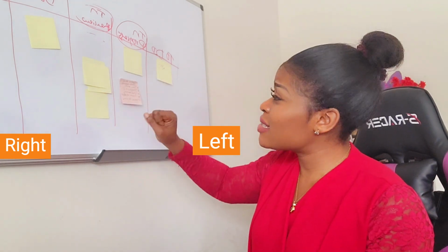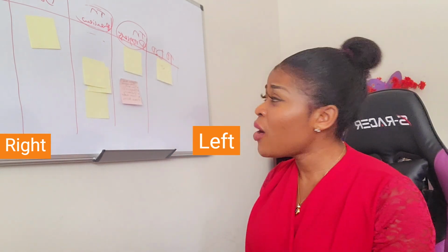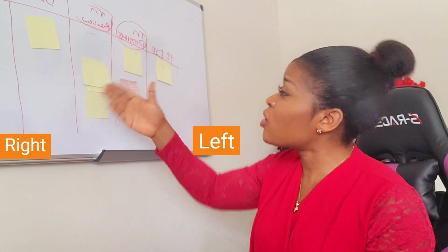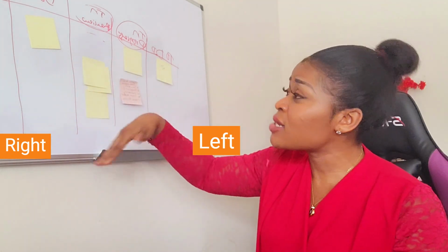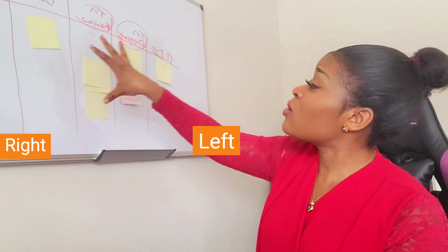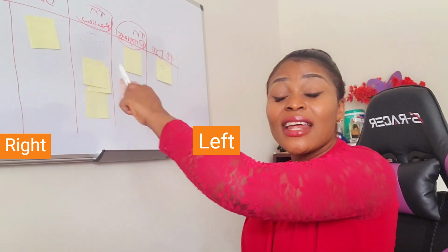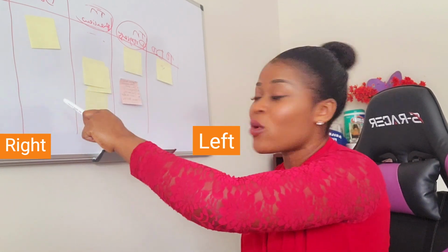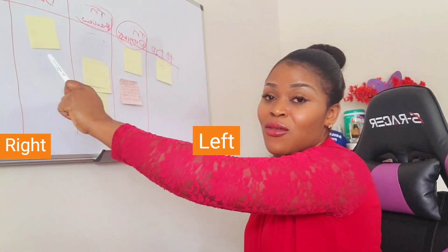Okay, I'm asking the team member, okay, I noticed, as you can see, it's gray. So what's going on? Do you need help around that? Is that what is stopping us from closing this out? And especially if we are just 3 days to the end of the sprint or 2 days, what's stopping us? Let's figure out what that thing is that is stopping us, so that we're closing out the items here and moving them to the done column, so that at the end of the sprint we are having more complete work items. Until this, I see that this is moving, right?